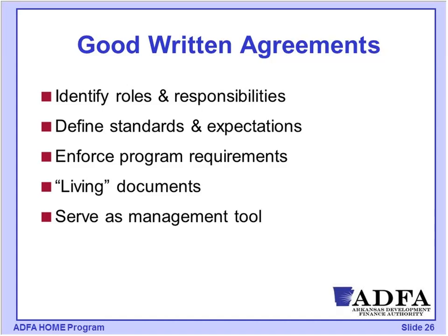And so if, let's say, as a developer you found that you needed to change the number of designated units, or you had, let's say, a budget shortfall and additional money was being brought in for the project, that agreement, which outlines all of the budget, all of the program requirements, would need to be updated to appropriately reflect what that project would be.